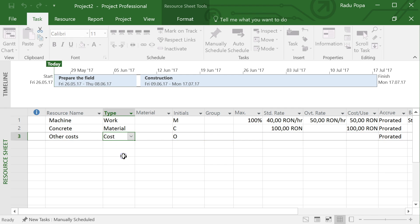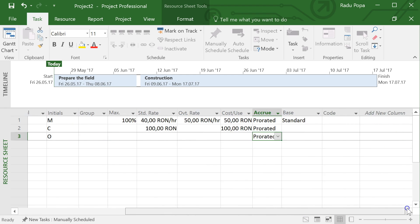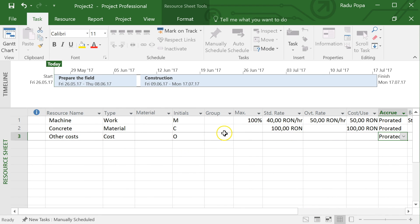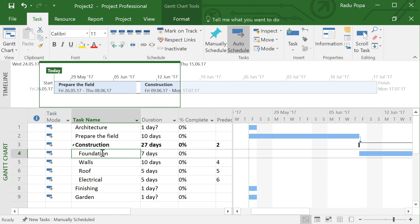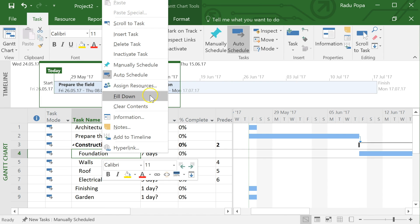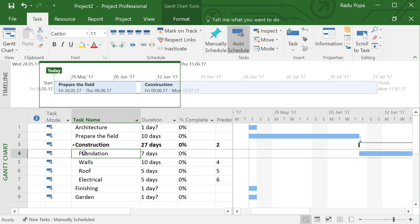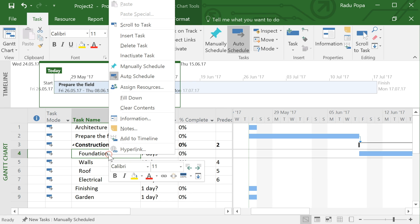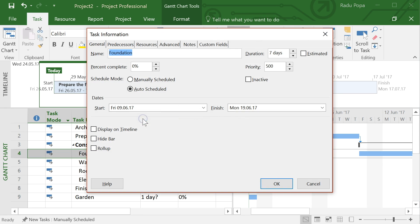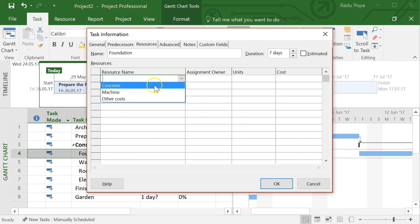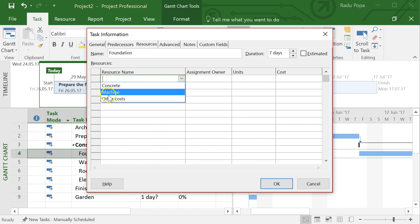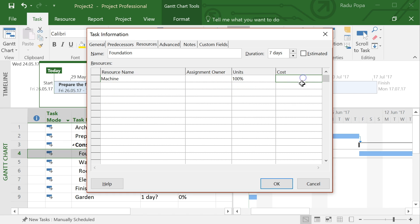I can also define a cost resource — for example a permit fee — where I just assign it a fixed value rather than a rate. Moving back to the Gantt chart, for the foundation task I'd like to assign a resource. I'll double-click on it to open the task information dialog, go to the Resources tab, and assign the machine resource to that task.